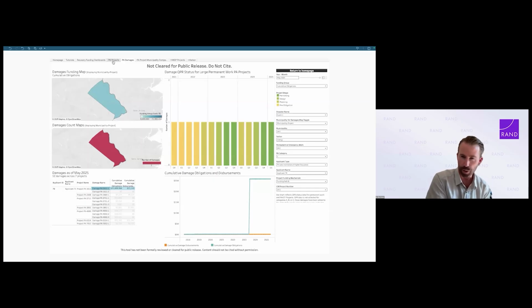So a reasonable question would be, why do projects move backwards through these process steps? It varies, of course. There's lots of reasons. One of the common ones that we see is when a project goes out to bid, you've got a certain budget in mind, you've got a certain dollar grant from FEMA to fund that project. But if all of the bids come back at a higher dollar value than that, then either you're going backwards in the process to design, so you can figure out, well, can I tweak the design to get this to fit within budget? Or am I going back to planning to figure out where to find more money to fund this project? Okay, that wraps up use case one.